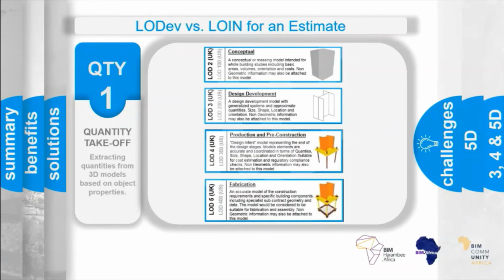So this is to say that the amount of detail in a model improves over time as information is added to its various design stages and through the various construction stages. So this takes us back to the earlier point, which indicates that not all quantities needed during takeoff can be extracted from the model, because not all quantities are modeled at every stage of the design progress. Similarly, not all items that would typically be considered measurable are modeled.